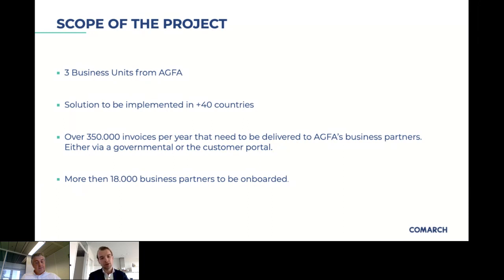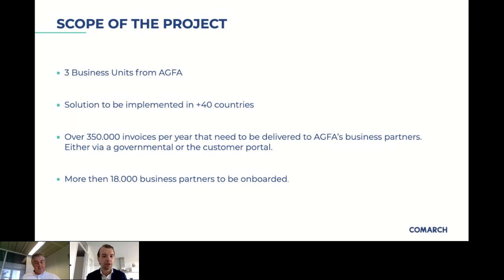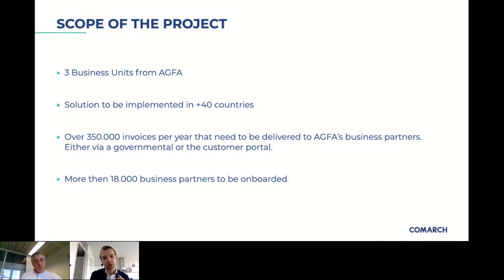You've already talked about lessons learned, including onboarding of business partners, and we're going live in France. The coronavirus has hit everyone. Could you explain more about the onboarding difficulties in France and the lessons learned? One key lesson was that in the beginning we had a very ambitious plan — we truly believed we could get all European countries onboarded in one to two years.